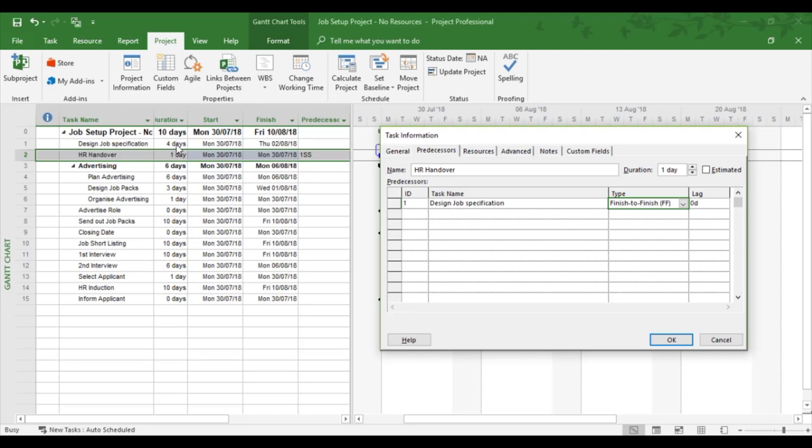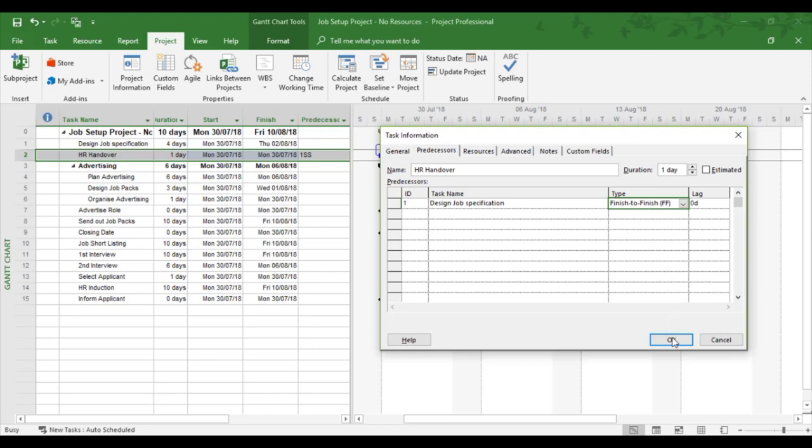But if the successor was longer, that means the predecessor task will then join the successor task. So it all depends on the length of the task. So finish to finish. And there we go. They both finish together according to the length of the task, which is the four day duration.